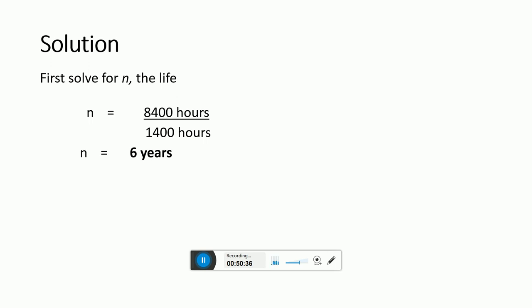Usually the ownership and operating cost components are calculated separately, as the tires are considered an operating cost element because they wear out much faster than the other components.